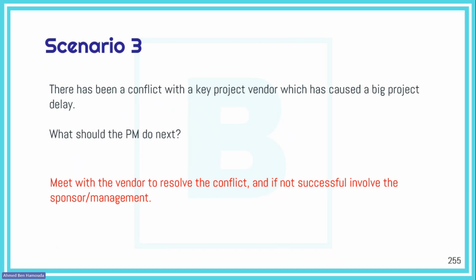And you add the note: if you do not provide your written approval within 48 hours, and with no objection from your side, then of course it is considered as if you have already approved it.